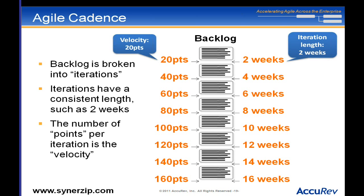For example, if I have a story to implement pieces of an online survey system — a true/false question is two points, a multiple-choice question is two points — that's four points, and I'd need about 10 such stories to fill one two-week iteration. So I've got a cadence of how much work that team can get done in each iteration.